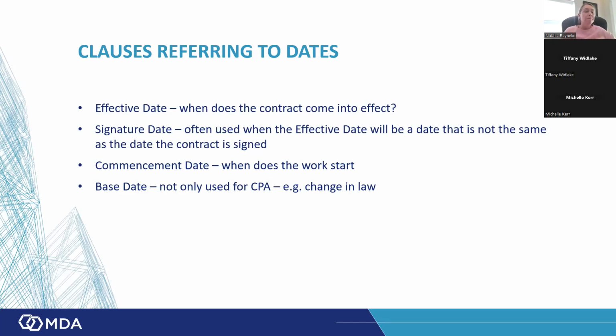So yeah, just some tips in terms of the dates. If you do see a lot of dates mentioned in the contract and you're not too sure, where's the site access date as well, where was the signature date, when's the contract coming into effect, just draw the timeline and make sure that you're comfortable with all of the dates and what they mean.